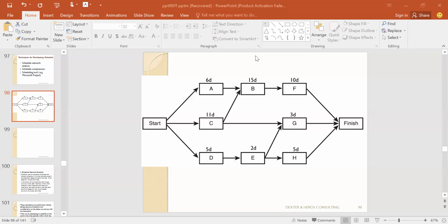Start from the part with the highest total duration and retrogress. You know what retrogression is? Retrogress is 10, 9, 8, 7, and continue, descending. So read it together. The formula for float: subtract the total duration of each part from the part with the highest total duration. Start from the part with the highest total duration and retrogress.